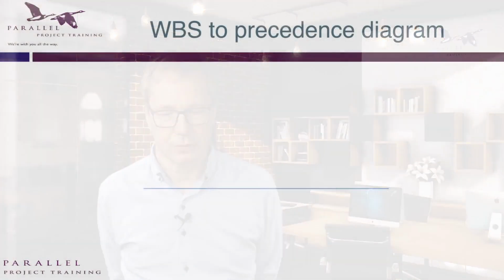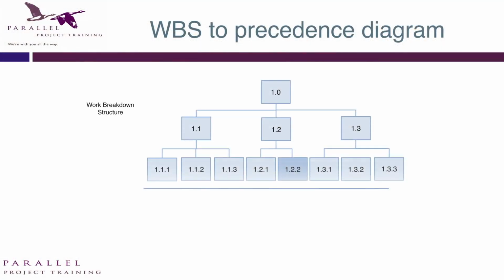So what's a schedule? What do we mean by scheduling projects? Remember we talked about the work breakdown structure. That identified all the work required to create the project, and identified there were different people involved. So I talked about some work packages may be contractors, some work packages may be agency staff. And I want you to ask the question, are you ever waiting for something off from another person before you can do your work? And those dependencies are what we're trying to understand.